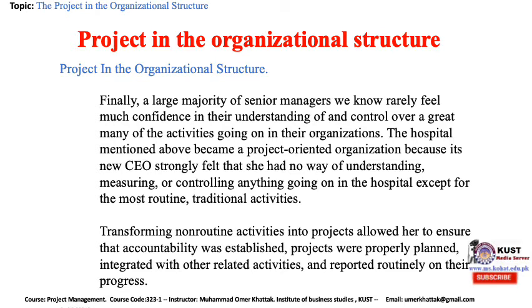A full treatment of this subject is beyond the scope of the book, but several observations are in order. First, the process is time consuming. Even when the required resources are available and senior management is fully committed to the transition, it is still an arduous process. Our experience indicates that when all goes well, the transition rarely requires less than 3 years.